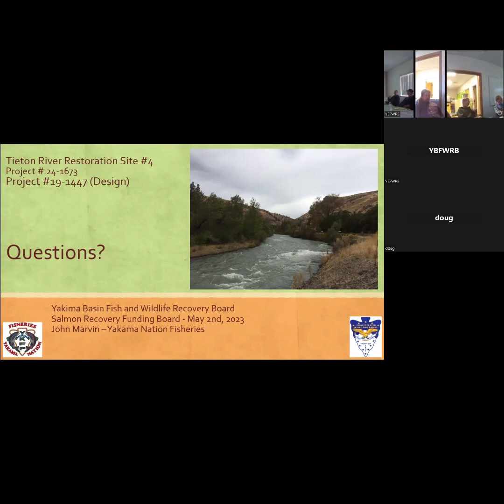Since we have the assessment and we've identified numerous other projects, I could roll it into a targeted funding application for construction of this one, and design and maybe construction of some of the other ones. That just occurred to me. One possibility is to do a separate application for each and withdraw one when you get to a point of knowing where things are headed. This is a new game for us, so that's something we want to talk about, but it could be considered. You can't fund the same elements of a project with both pots of money. But you could certainly run this application and run one that included, say, design work in the targeted until you see how things rank out.